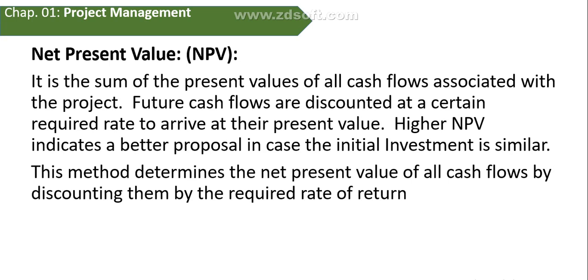However, there are limitations of net present value too. There is no generally accepted method of deriving the discount rate used for the present value calculation. The NPV does not provide any picture of the profit or loss that an organization can make by embarking on a certain project.